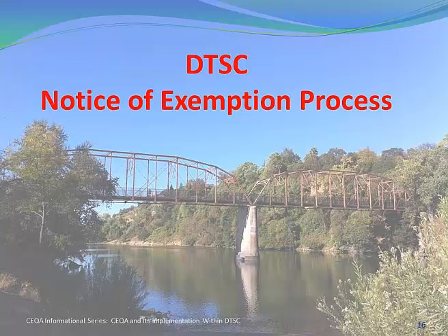This is now the third or the fourth time that we're dancing around the same subject. When there is a permit renewal request, which is really a discretionary decision to approve a new permit that will last probably 10 years at least, we're going to need to look at what sort of environmental documentation was done the last time around. Was there a negative dec? Was there an EIR? What did it find? What was the project that it reviewed? And what is the project that we are looking at now?